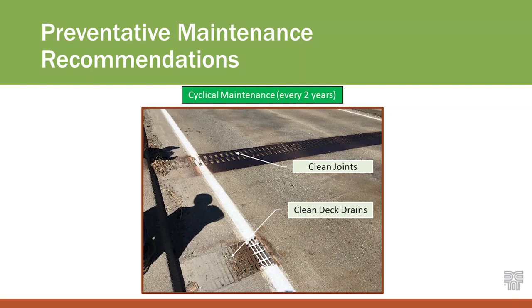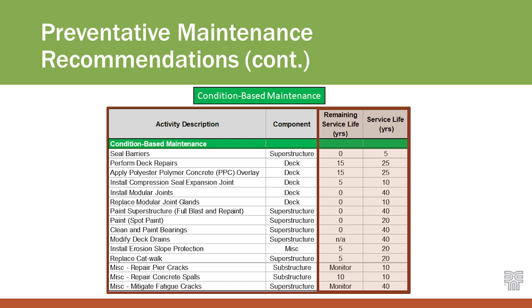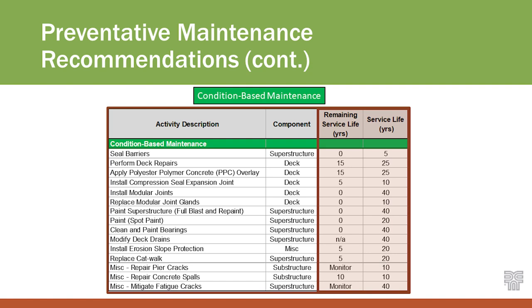What activities apply to this particular structure? Cyclical maintenance is pretty straightforward — clean the bridge. This structure has a lot of logging truck traffic up in the north panhandle of Idaho, so there's a lot of debris that builds up in the deck drains. For condition-based maintenance, here's a list of the activities we identified. I want to draw attention to the two columns on the right: remaining service life and the actual service life of a particular action. In 2012 there was a repair job including the polyester concrete overlay and non-destructive deck testing, and there's still some remaining service life left on that overlay.